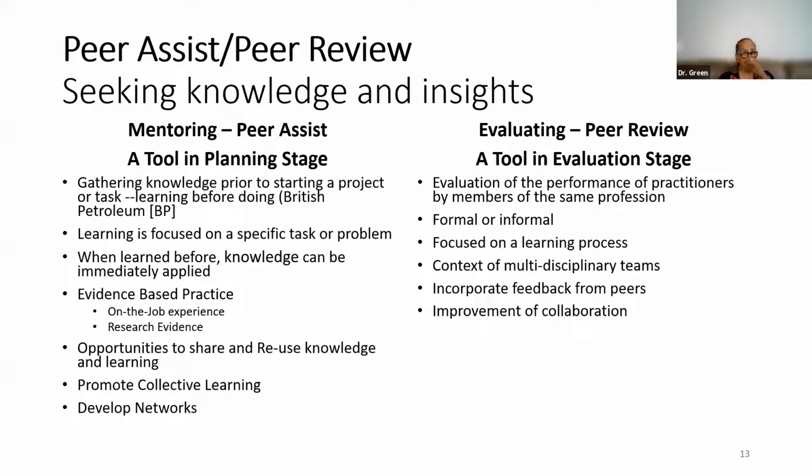A peer assist basically is you're mentoring, you're there with them and you're working through it. A lessons learned generally happens after a task has happened, and you talk about the obstacles that occurred and how you got over them. You can also talk about the best practices. A lot of times people only say lessons learned, but you can talk about best practices and lessons learned, so that after you've gone through, you're aware of things that you should probably continue doing, and also aware of obstacles that you could avoid, or if they occur, handle. So the peer assist is working with them. The lessons learned is what transpired and how we handled it. Does that answer it?